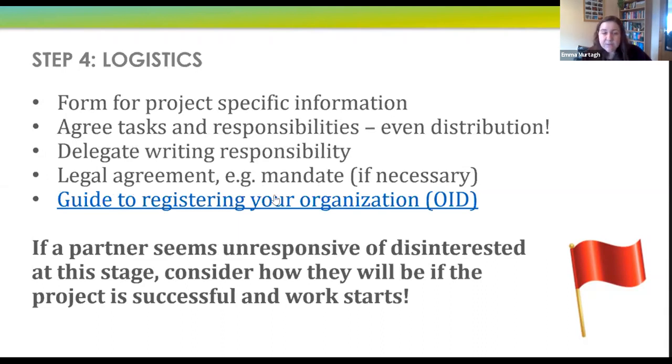Any legal agreements, for example, mandates, it varies according to programs. In Erasmus, for example, you do have to have a mandate, and that's available. You can just generate it off the Erasmus platform, and they get it and they sign it and stamp it and scan it and send it back. This is something that's just best done early. You can be under the illusion that, oh, this will be easy, we'll do that at the end, but it's just easier to get it out of the way early in the process, because it can be a real panic towards the end trying to do that.